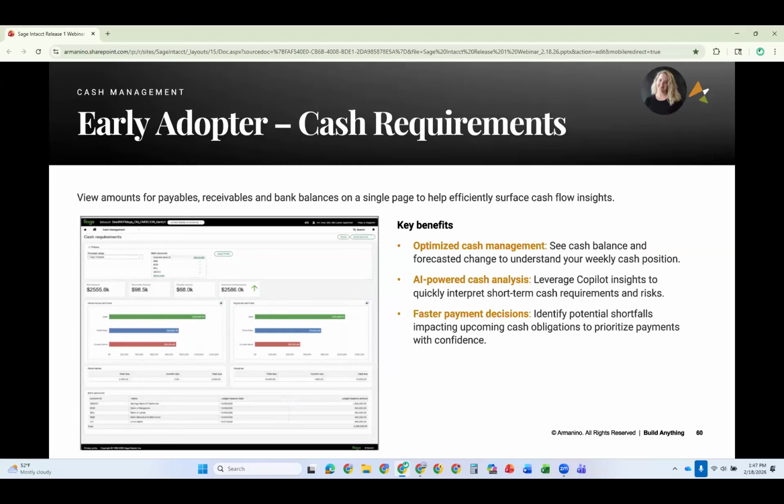The flexibility of the release retainage function has received some enhancements too, to meet regional requirements and expand retainage release options so that you can have another way to process your retainage. And you can still set per invoice line on the AP retainage release page. And we are also seeing enhancements in that when you're selecting the release retainage button, the new retainage window opens up and you can enter a specific percentage of the retainage to release. And so it's great to be able to have that